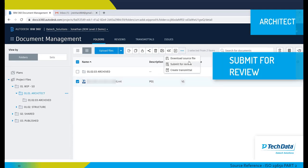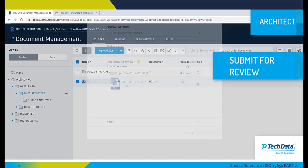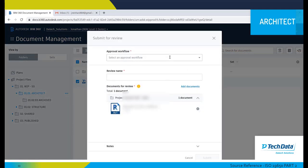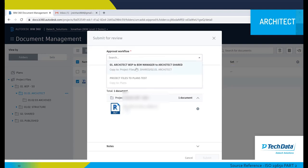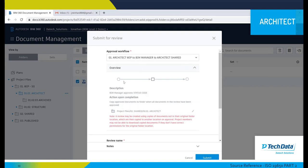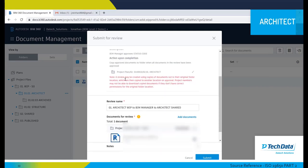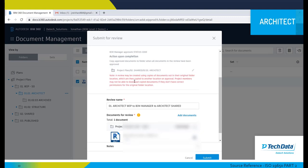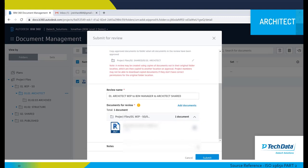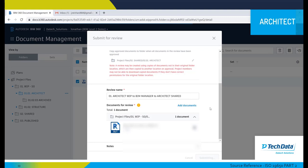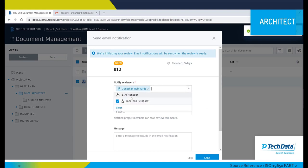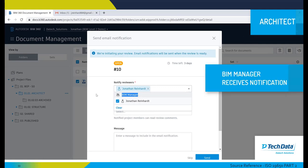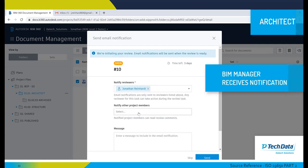In this case we're using the description tag to apply our revision metadata. We're going to submit it for a review to be reviewed internally by our BIM manager and then to be copied to the shared area for the structural engineer to retrieve. We're going to submit for review using a pre-setup approval workflow as created in BIM 360: architect to BIM manager to architect shared.